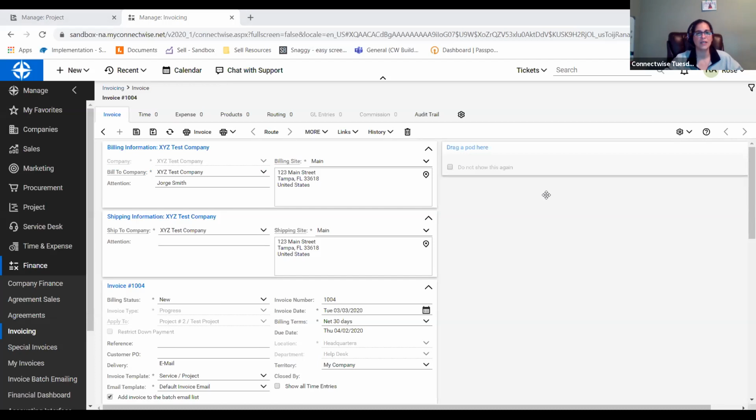you'll see here now that it's telling us in our header that this is a fixed fee project for $3,500. However, we're billing only the amount available that has been used to date of that $3,500. So it's going to bill that $150. If I had $2,000 in there, it would bill $2,000 based off of the time. Okay, so it's whatever you put that WIP number value in, that's what it's going to invoice, so that the client is getting current invoices kind of ticking away at that fixed fee. But again, it will never bill more than that $3,500 that we set it as a fixed fee, okay?